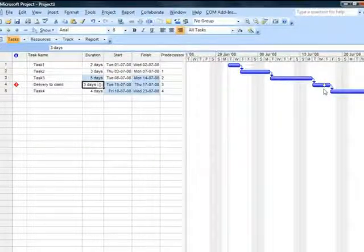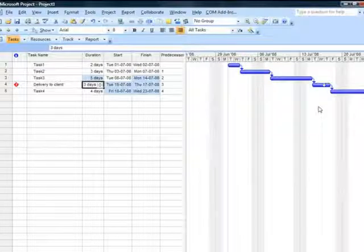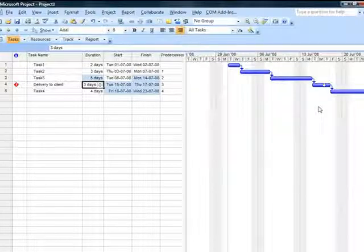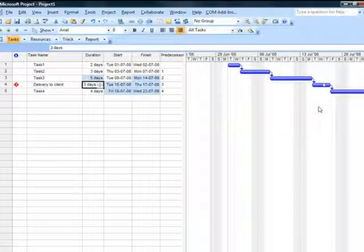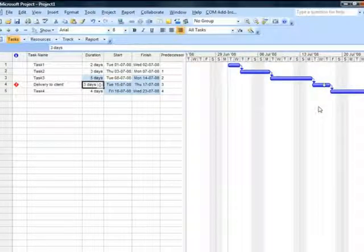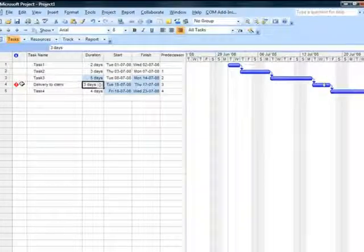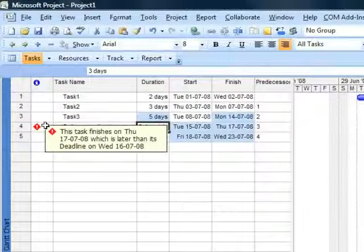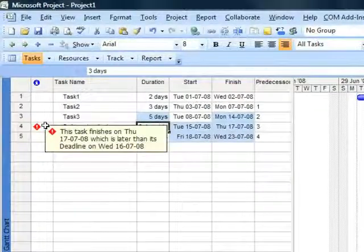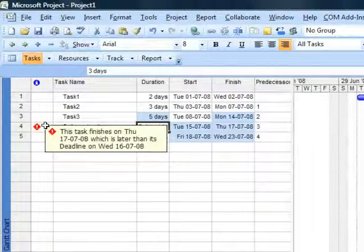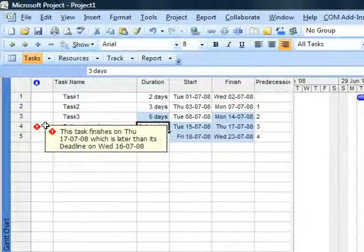But you will observe my deadline date is static. It has not participated in the schedule nor has it moved forward. However, in my indicators column I am informed about the missed date.